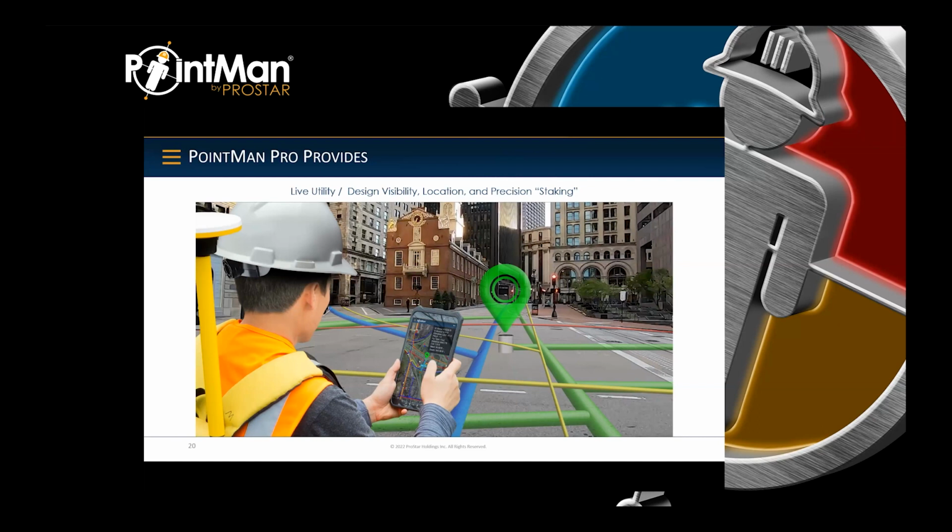We had another question here. It says, if you find discrepancies in the field relating to the as-found location of utilities, how do you inform the utility owners? So if we find something that's drastically off from where the utility records are showing, we like to get an in-field meeting with the utility company to go over what we found versus what the records show. And then from there, we would do quality level A test tools to verify our marks. That doesn't happen very often though, correct? It happens all the time.